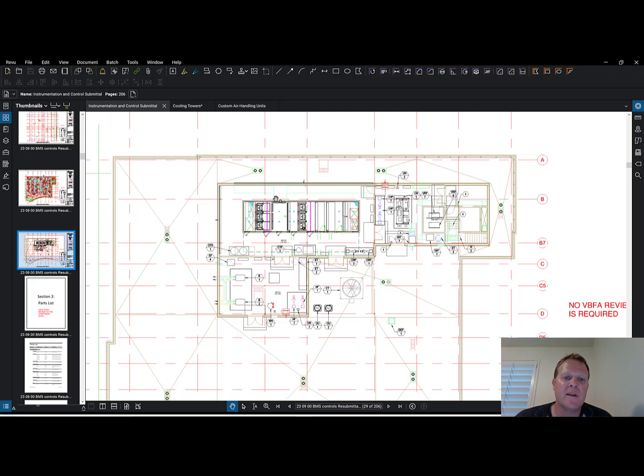And we started on the side without the air handler. Had we done that again, we started on that side because the owner was doing the earthwork. It wasn't in our contract to do the earthwork. And they built the pad for the side of the hotel that did not have the air handler in it first. Well, when it came time, and it was the Kimball Junction Park City area, came time to heat the building, we were running a lot of temporary heat because we did not have the side of the building built early that had all the air handling, mechanical equipment, and that kind of stuff.